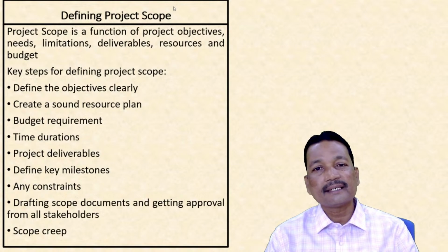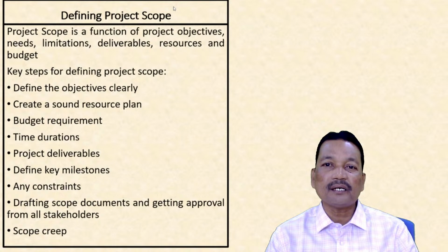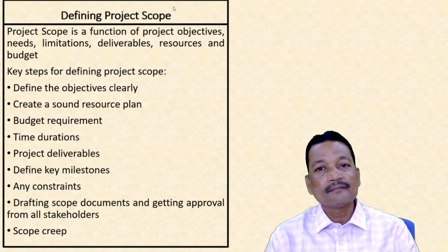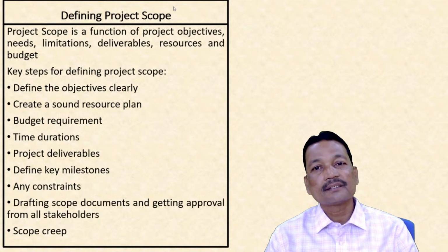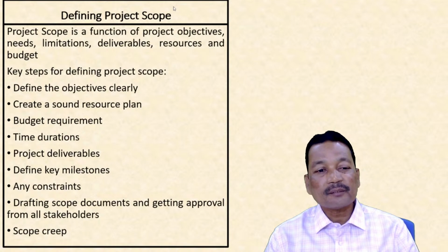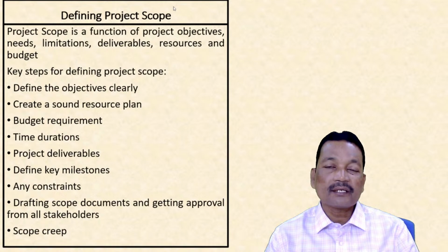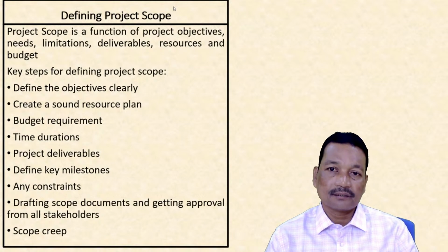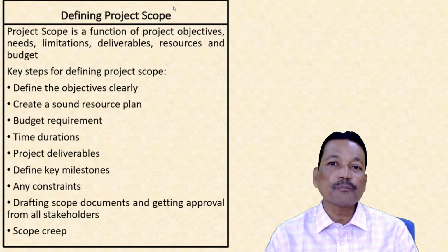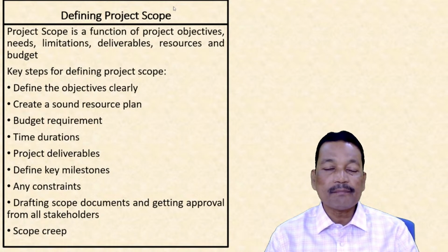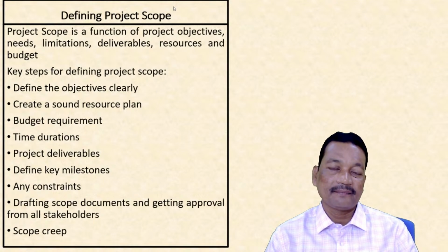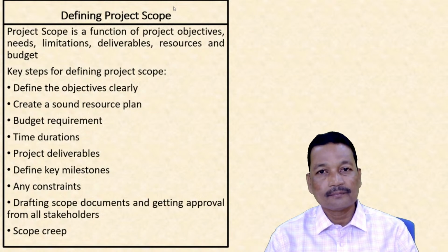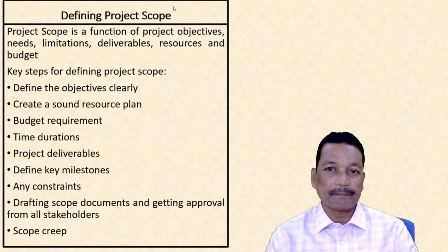many times it has been seen that while the project is going on or is being executed, demands for expansion of the scope arise, in terms of the reach to various customers and various geographical segments getting expanded. What does it impact on the project? The project's time and cost will also get expanded, or become higher and higher. That is called scope creep.